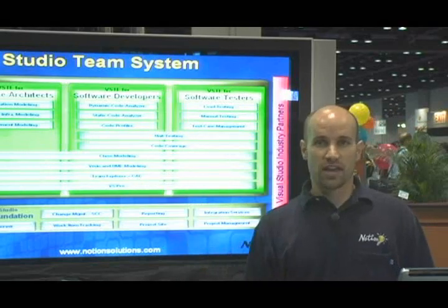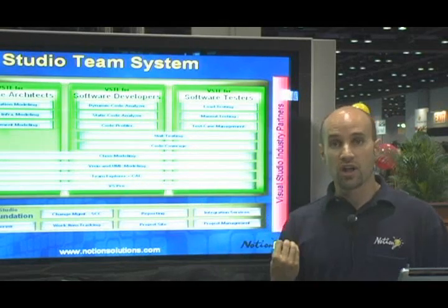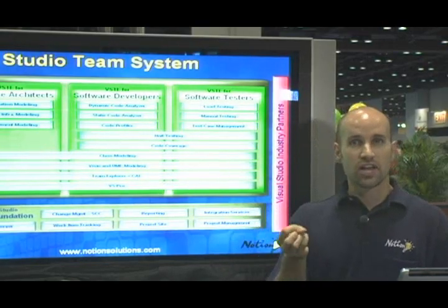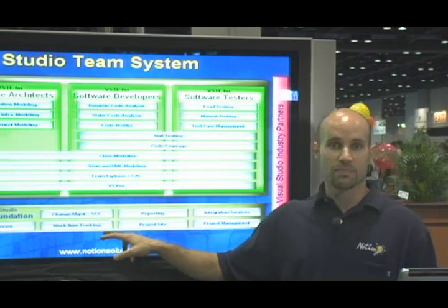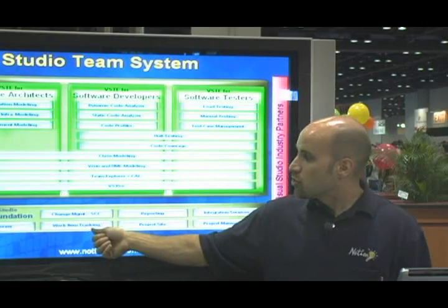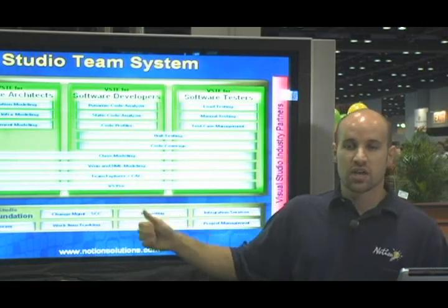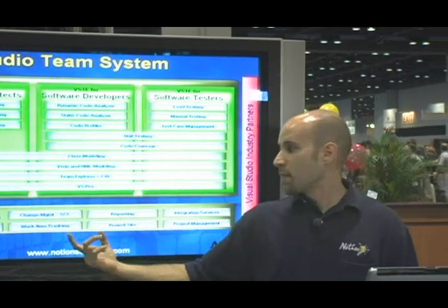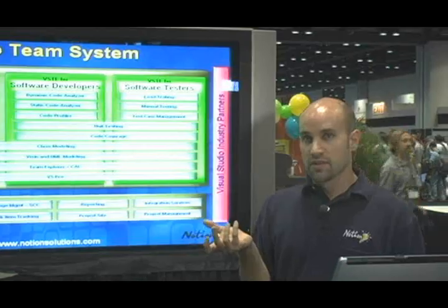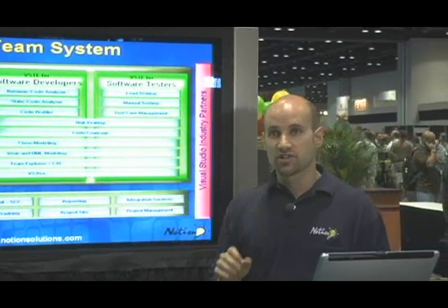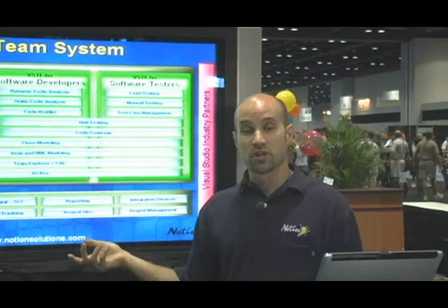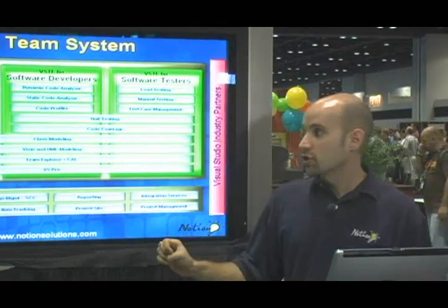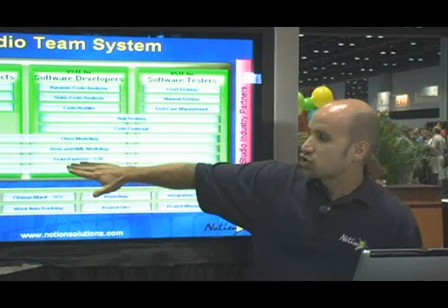Likewise, if you have a project manager and they want to interface with Microsoft Project, they can do so. There's an add-in for Microsoft Project that allows Project to synchronize with the work item database. In doing so, they're going to need a client access license. They will connect to the work item database, and they will be able to pull data from a task perspective out of the work item system and into Microsoft Project. They can do project planning in Project as they normally would, and then they can take that data and publish it back into the Team Foundation Server. So that's going to be those two bottom options.